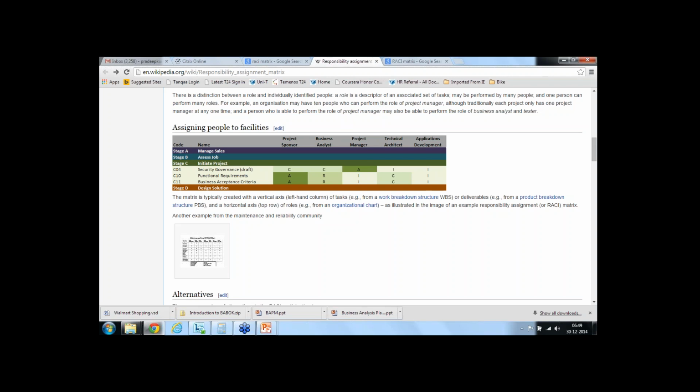The terminology we normally use in BA is that when you have the first version, which is officially published or first officially signed off, that version is termed as version 1, 1.0 or version 1. Before that, whatever the draft version, you can probably use 0.01 or 0.11, something like that. So that even if you go through 10-20 iterations, it looks logical that your first official version is version 1.0 or version 1. So you can use terminologies like version 0.01 and 0.02, like that.